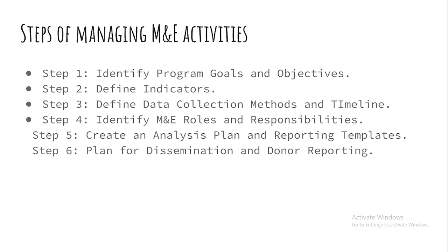Step number four: identify your M&E roles and responsibilities. Once you've defined the activity, indicators, data collection method, and timeline, you assign responsibility. For example, as the M&E officer I'll manage data collection in the schools, the data officers will collect and enter the data, and I'll be responsible for analyzing and reporting.